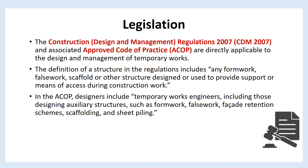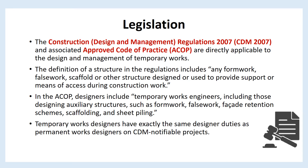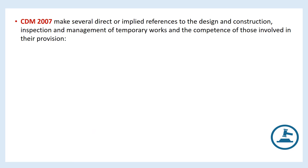In the ACoP, designers include temporary works engineers, including those designing auxiliary structures such as formwork, falsework, facade retention schemes, scaffolding, and sheet piling. Temporary works designers have exactly the same designer duties as permanent works designers on CDM notifiable projects. CDM 2007 makes several direct or implied references to the design and construction, inspection and management of temporary works and the competence of those involved in their provision.